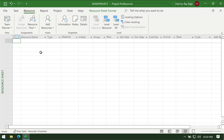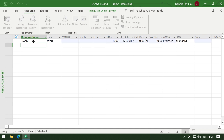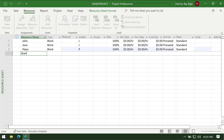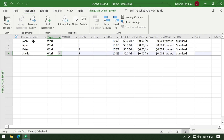From here, you can list down all the resources that you are going to use for this project. Let's start with the first type of resource — the person, the people, or the work resource. Let's put their names: we have John, we have Jane, we have Peter, and we have Sheila as part of our team. You will see that they will automatically be assigned the resource type of work.